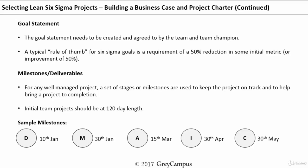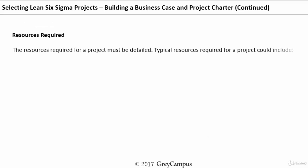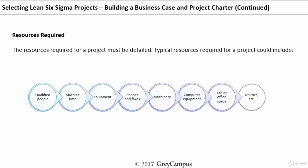If a project is prolonging beyond 8 to 10 months, it has likely gotten stuck and the probability of successful completion is very thin. As part of the project charter, we also identify the resources required — qualified people, machine time, equipment, computers, lab and office space, utilities, and human resources. These must be meticulously planned so that resources are available at the right time for the project work.